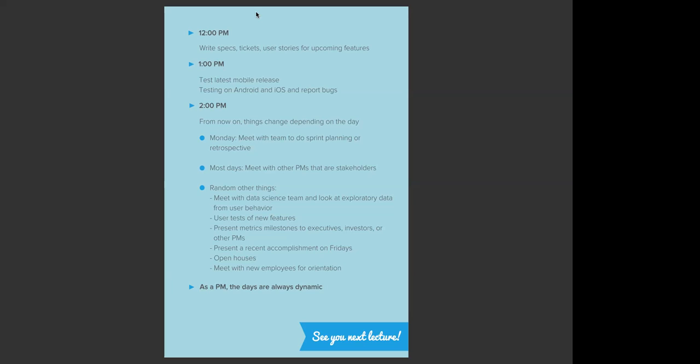So people were getting confused about the copy. These things are important, but you have to prioritize. It does not impact the overall health of the product, so there's no need to spend so much time on that. If people cannot log in or are not able to even access the app, you prioritize that. So grooming is you going through your backlog. Yes, I see you sent us a ticket, but it's not that important, so we leave it at the bottom.